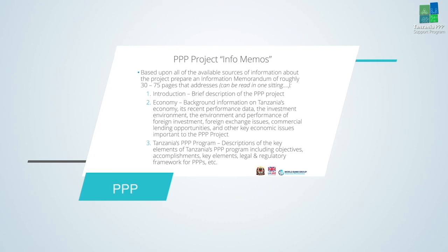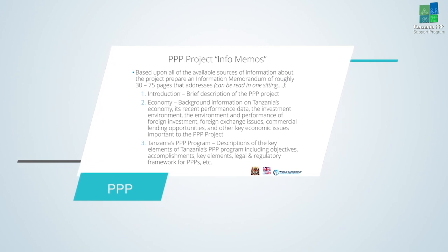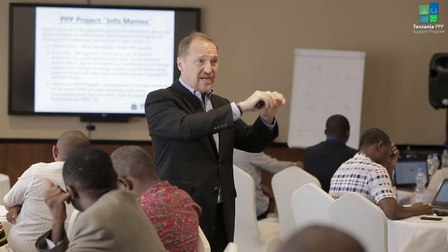Yes? How does this differ from the concept note? The concept note occurs before, that's in the pre-feasibility study phase. We've identified a project, here's what we think it is, here's the available information, but we don't know the size of it. Maybe we haven't determined the size of it yet, the output standards, how the risks would be allocated. So the purpose of a concept note really is to decide, should we do a feasibility study or not?